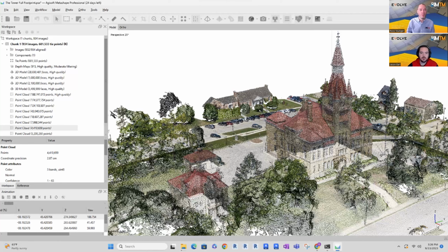It can take PDFs. And when you talk about construction monitoring, what's really neat is that there are apps where, right within your phone, instead of taking 360 photos and 360 scans, if the primary area that you've worked on is putting in the final ceiling, you can go and just with your phone document that and do a more segmented upload, getting some of those progress reports in there.